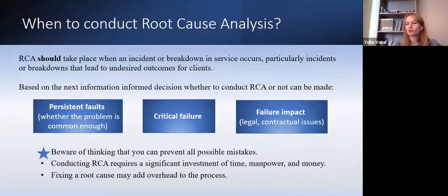You have a few probably ways. You can start again from something critical. So let's say if your defects have a priority or severity number higher than something, you could start with this group. So it's better probably to categorize them, right?